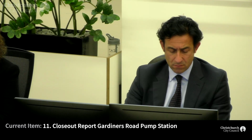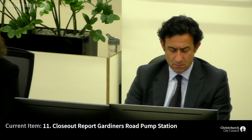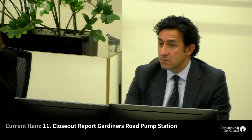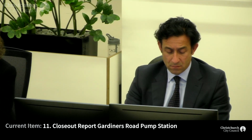In terms of time, we were supposed to hand over the project by the end of June 2018. The entire construction work was completed by the end of May 2018, and we started testing in the last month. However, during the test, we came up with some complication, which I will explain later. So the pump station was put online on the first week of July 2018.